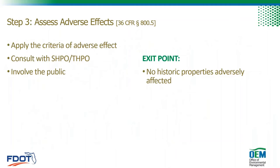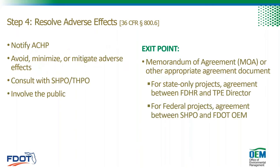In Step 3 we assess adverse effects by applying the criteria of adverse effect, and we consult with DHR and involve the public. If we determine that the project will have no adverse effect and DHR concurs, we're done. If our project will have an adverse effect, we attempt to resolve them in Step 4. In Step 4 we consult with DHR and any other consulting parties to develop minimization or mitigation measures to resolve adverse effects, and we record them in an MOA — a Memorandum of Agreement — or other appropriate agreement document. An executed MOA evidences completion of the Section 106 or Chapter 267 compliance process, even if stipulations can't be completed until after construction. Those stipulations should be recorded as commitments in the project commitment record and the commitment section of the environmental document.